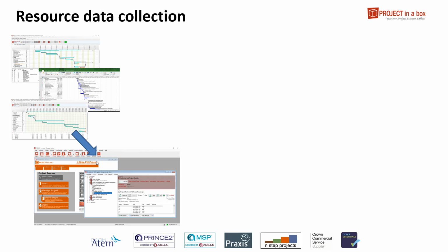To update it you check the file out, you make some changes in Microsoft Project, you check it back in, and then we look and monitor for those important files, and when they're updated we do something with them. Now we know that because there is a list. Each project keeps a list of important files which are sources of data that need to be then worked on.